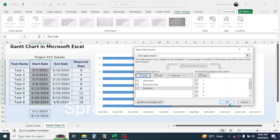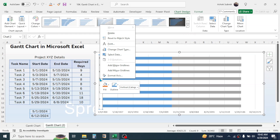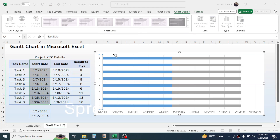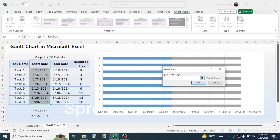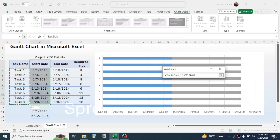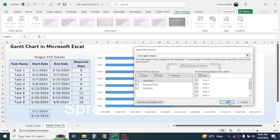Now we need to display the task name. Click on the Y-axis value, right-click, then click Select Data. Click the Edit option, and in the axis label range, select the task names. Click OK. Now the task name is added. Click OK again.